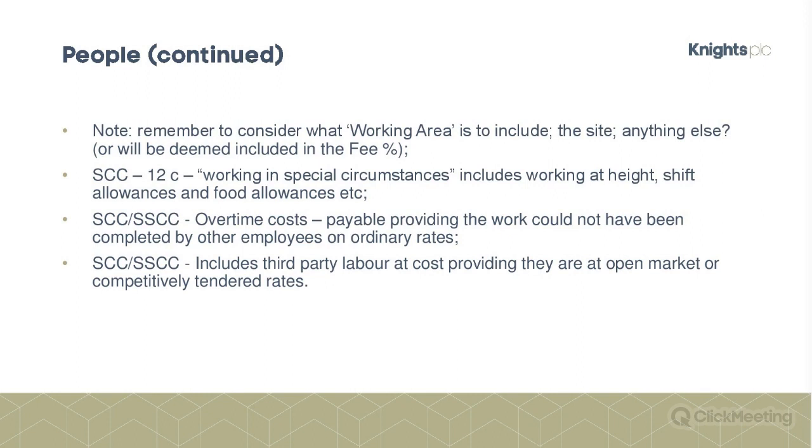Just note, the schedule of cost components at 12C, one of the items that you can claim for is working in special circumstances. So that could be working at height, shift allowances, food allowances.